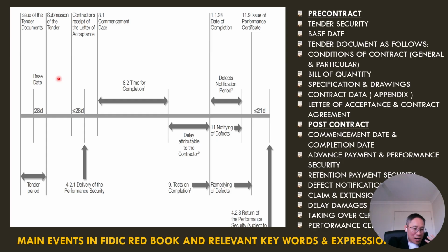They may check the tender price, the technical aspects, everything, and after that, tenderers may be invited to a tender clarification meeting to clarify their tender and explain the uncertain things in it, and then they may have a chance to resubmit their tender in order to ensure compliance with the employer's requirements.